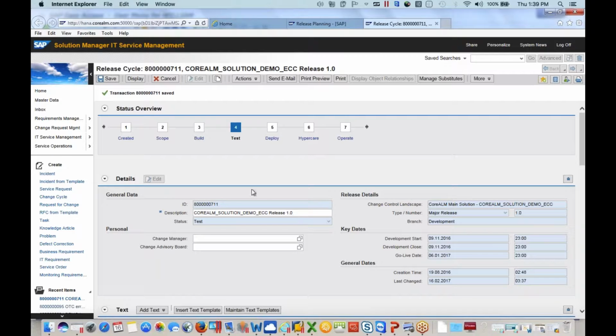So right now this cycle, this container, is going to hold everyone for them to perform testing. That's a centralized way for you to control users and developers not to introduce any new chains, so you synchronously have control of that. Eventually, you can synchronize multiple releases because you can bring everybody to test from one central place, right? You can move all the different cycles to test. Everybody tests synchronously.